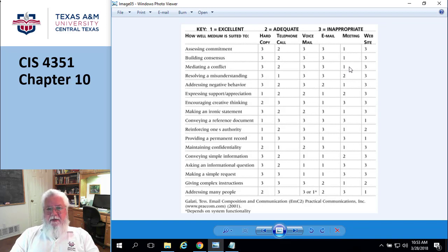And then the last one is forecast, and I would recommend you use an earned value management, EVM, approach for, here's how much I think it's going to cost at the end, and here's how long I think it's going to take to get to the end. So those are the three kinds of reports: progress report, status report, and forecasts. Kind of weird that they laid it out that way, but anyway.